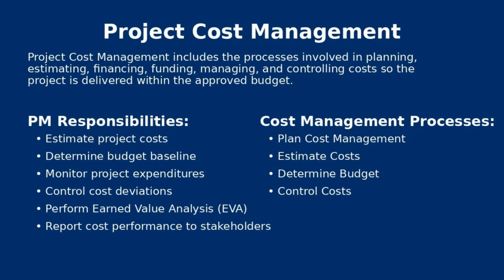Once you keep reiterating and then replanning, you come up with more detailed planning. As and when you get more information, and when the planning gets refined, you come up with a definitive estimate. This you call a refined estimate, because it's going to have a range of only plus or minus 10%, or probably minus 5 to plus 10%. This will be the most accurate estimate for you. These are the estimate ranges that you need to be aware of when you estimate.